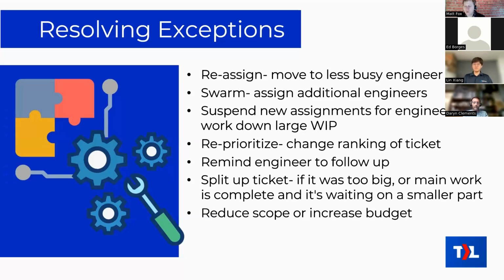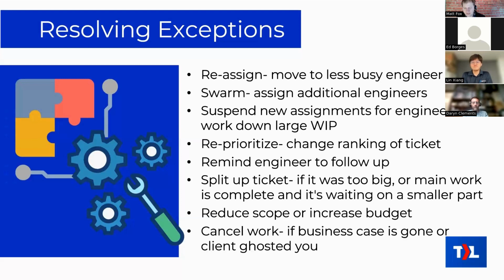Finally, one technique here is to reduce the scope of that ticket sometimes, or increase the budget on the ticket if there's a ticket that's got to be done and it's taking longer than expected, but you just got to do it. Go ahead and increase the budget there. And finally, it is okay to cancel that work if there's problems with the work. Maybe you just don't finish the ticket, and you do that if the business case is gone. Maybe the ticket's been open for 3 months, and you know what, nobody cares anymore, or the opportunity is gone. Let's just not do it.